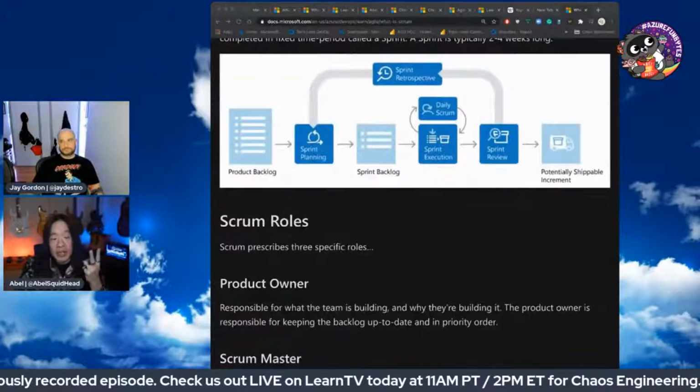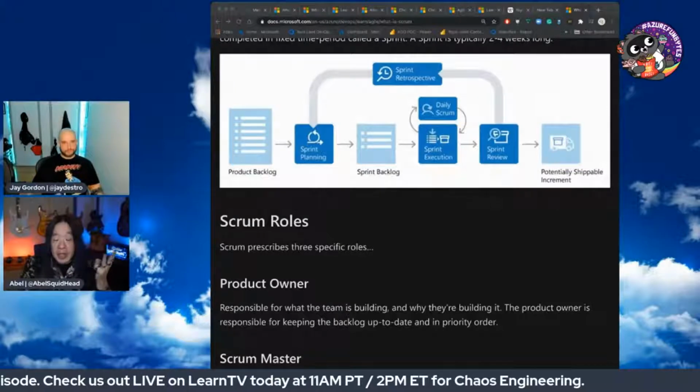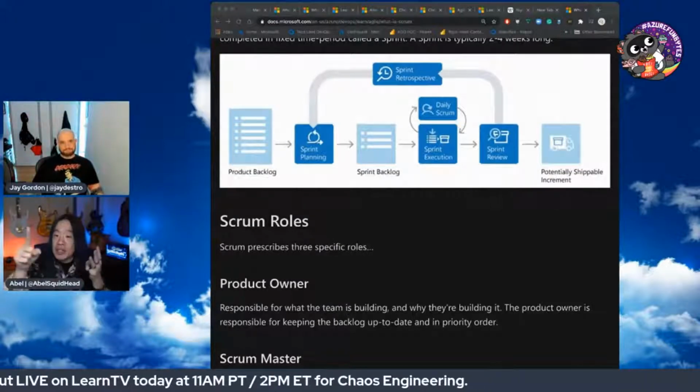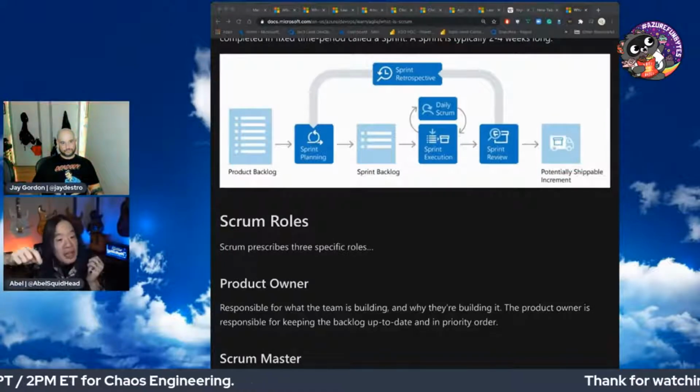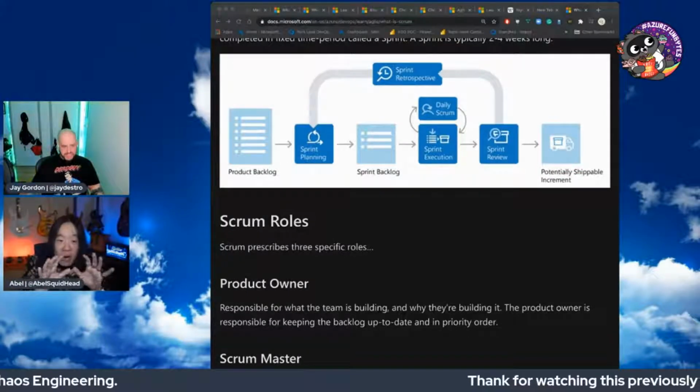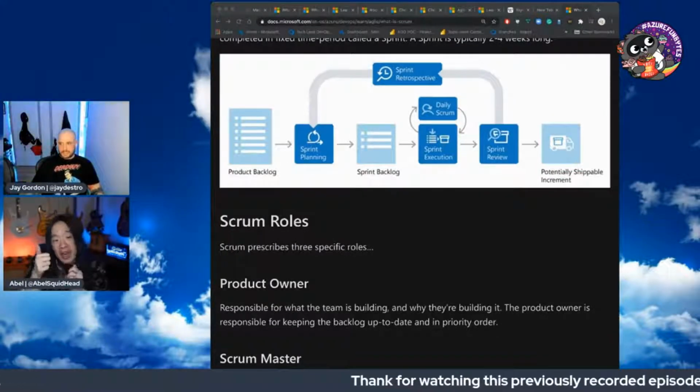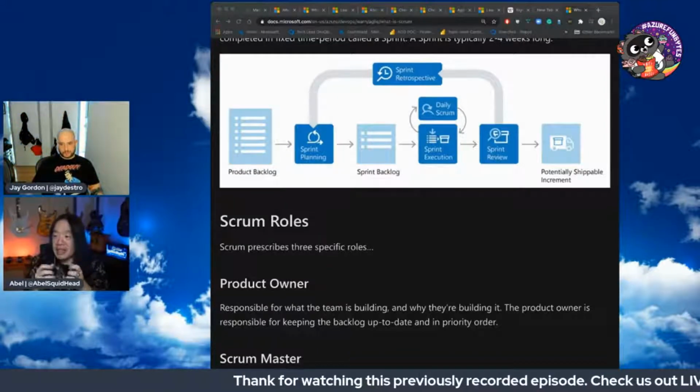This is what I plan on working on today. And if I have blockers, these are my blockers. And if I have blockers and someone else says, ooh, I can help you with that, you take that offline. You don't discuss it right then and there. Right? That's all daily stand-up is for. So that is one important ritual that needs to happen.